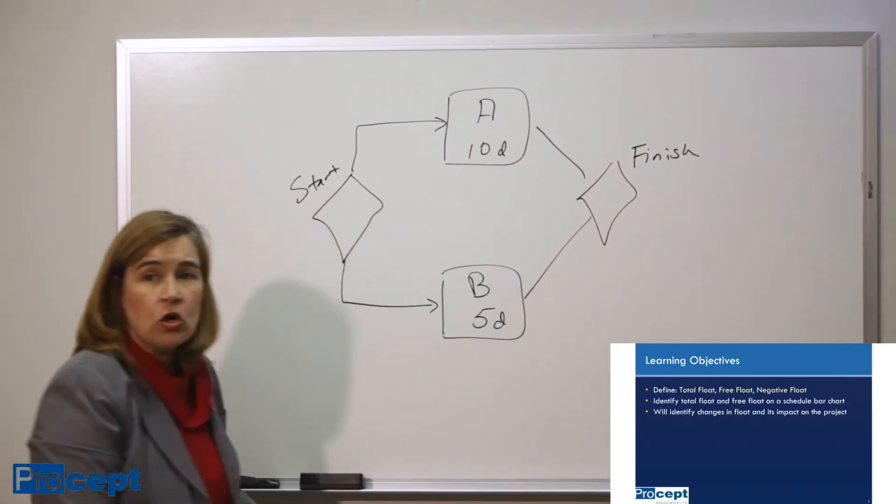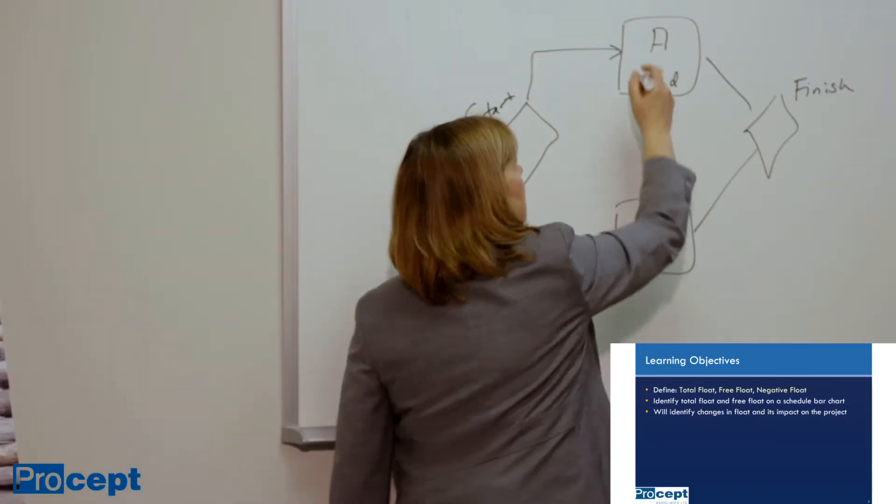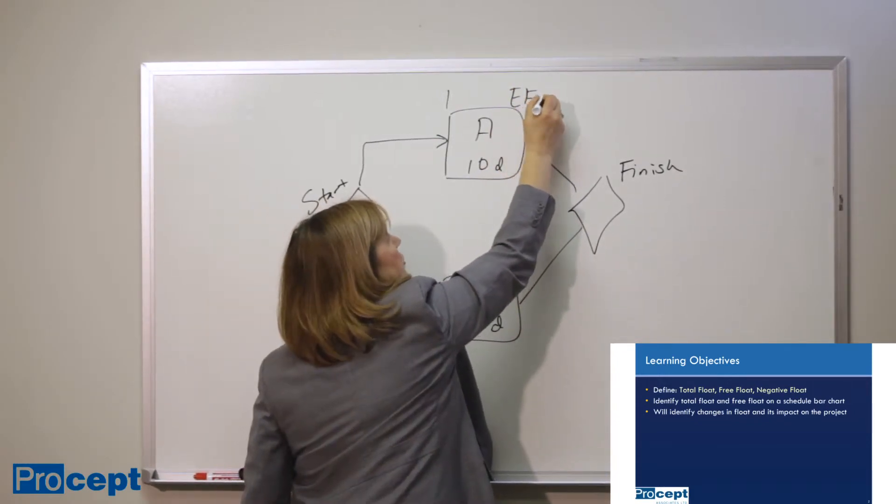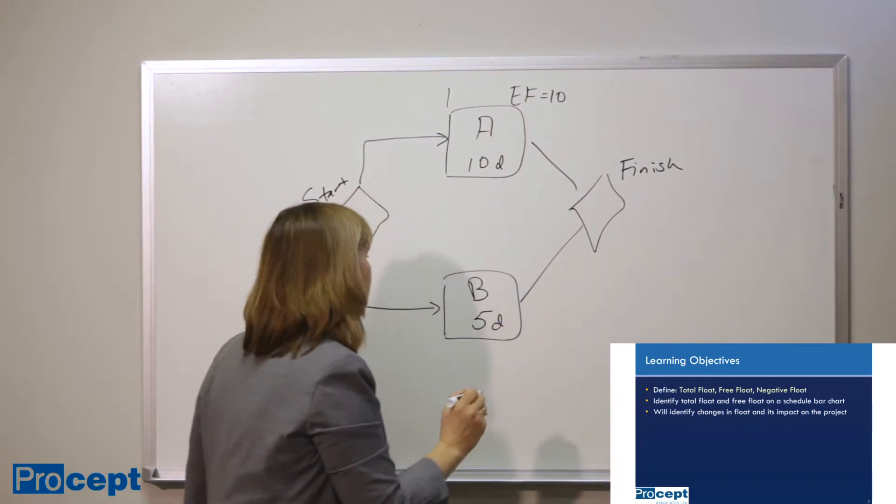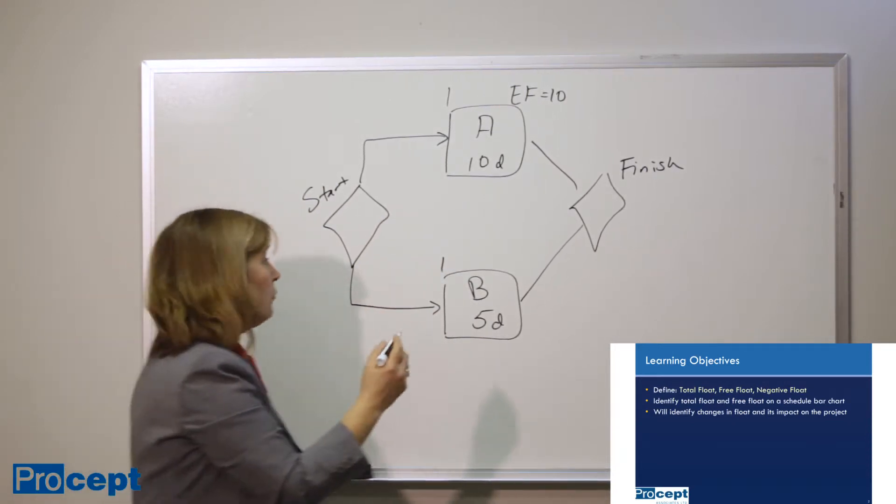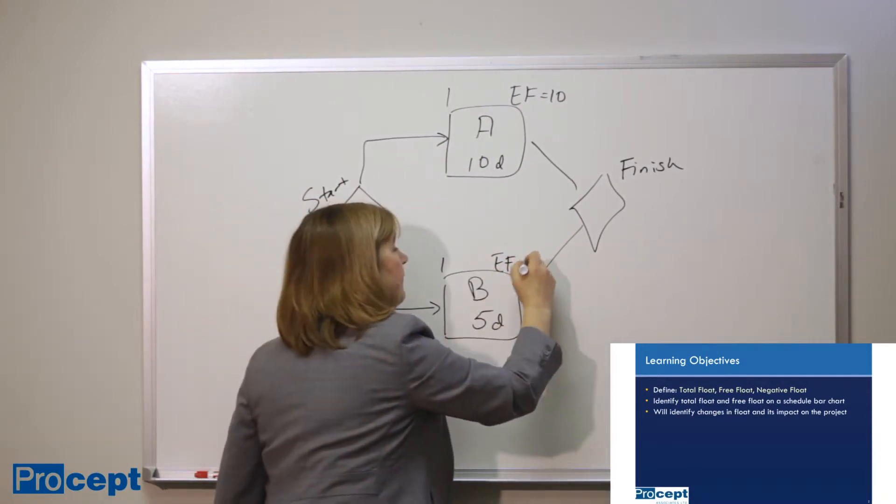So we understand that if we start both activities at the same time, if activity A starts on day 1, it will finish, we call it the earliest possible finish time, on day 10. If activity B equally starts on day 1, it will finish on day 5.